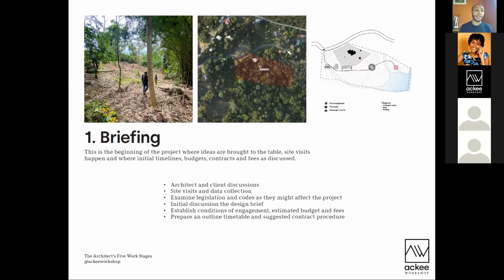even things like legal. Well, I'll give an example. If the client is coming to build a medical facility, we need to make sure that the site is approved to be able to build something like that, and it's not solely approved for residential housing, right? So it needs to be approved for a medical building, right? So making sure that the legalities are in check, and really kind of ironing out, but kind of getting an understanding of what the client wants.